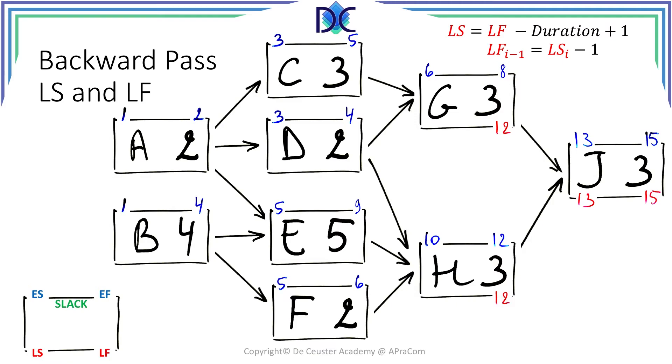We can calculate the late start by applying the formula which is 12 minus 3 plus 1 which is 10. So task G cannot start later than April the 10th. The same we can do for task H and we get the same result because they both have the same duration.